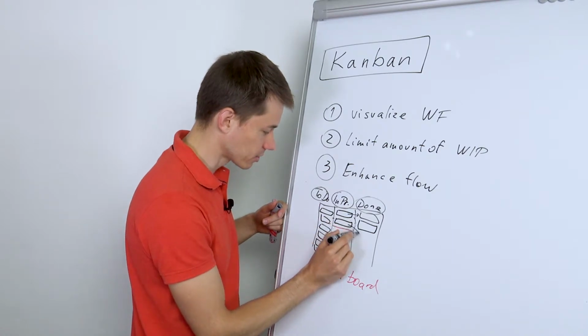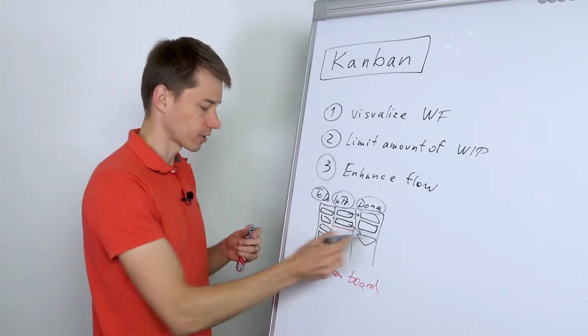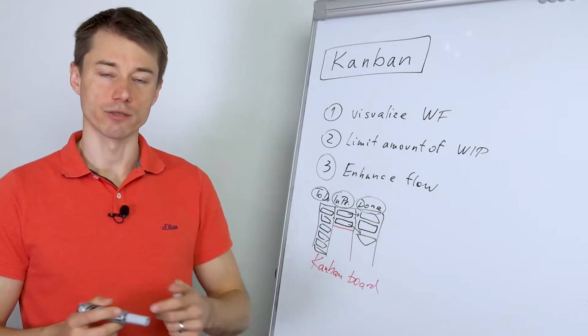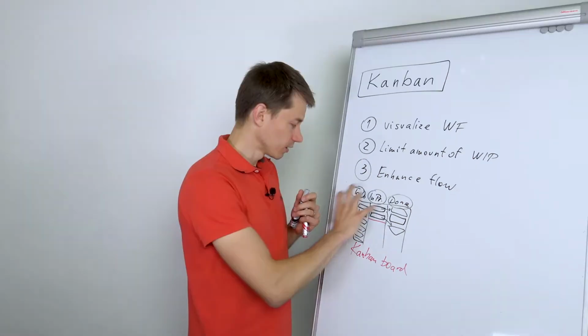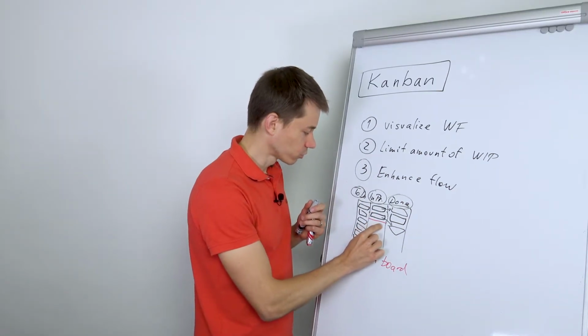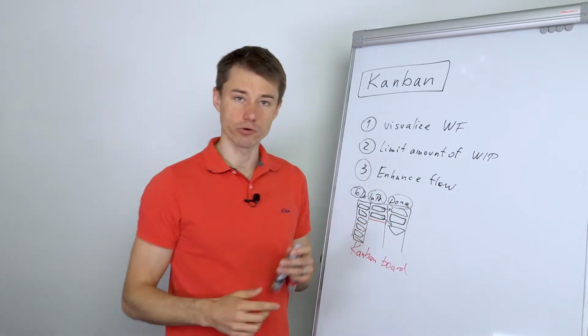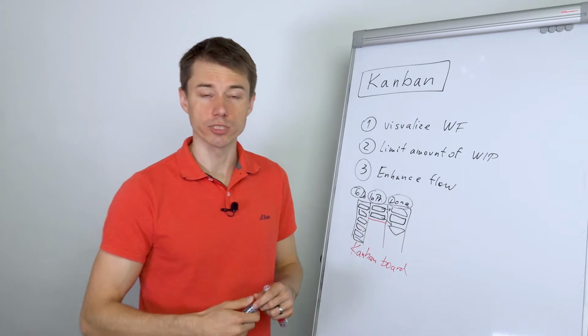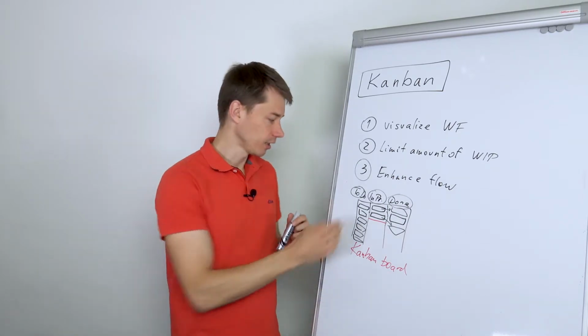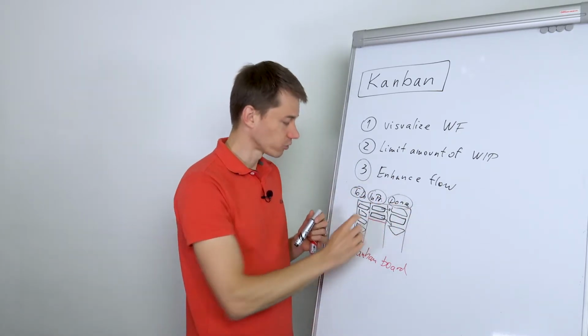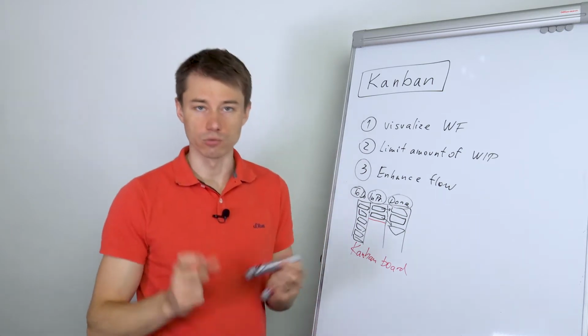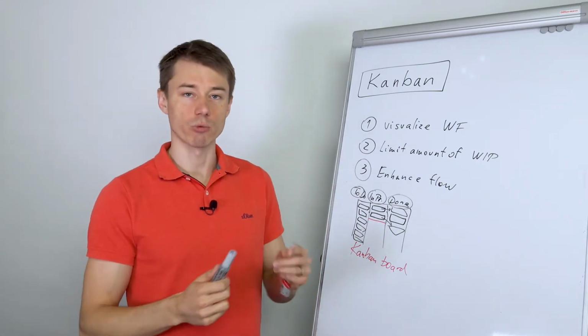And then as soon as this is done, it would move somewhere at the end of the list again, okay? So you want to make sure that you limit the number of tasks in progress to increase the productivity of developers. If something is blocked, it should be moved to another column, maybe labeled blocked, so someone else can unblock it.